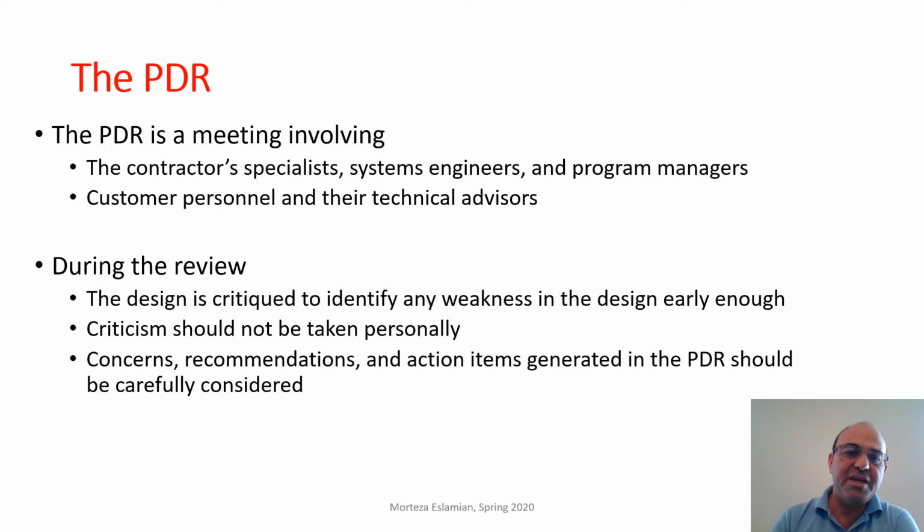Then the PDR, which is the preliminary design review, is a meeting. It involves the contractors, specialists like the thermal lead and leads of other subsystems, system engineers, and program managers. They will meet with the customer personnel and their technical advisors, to make sure that they are both on the same page, and to make sure that the customer agrees with what the contractor has done so far and what they are going to do next.